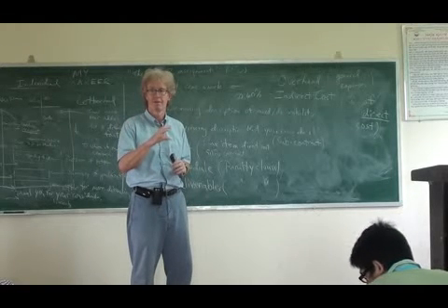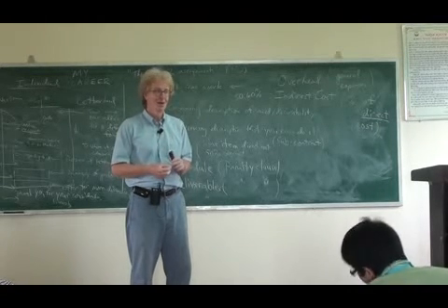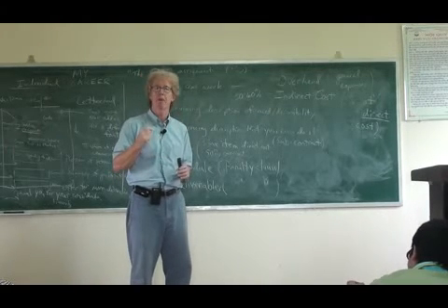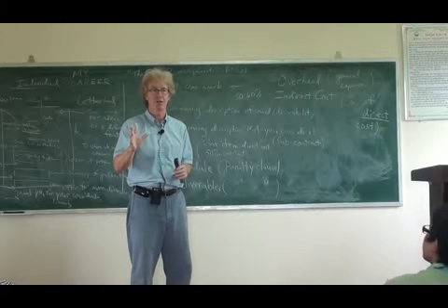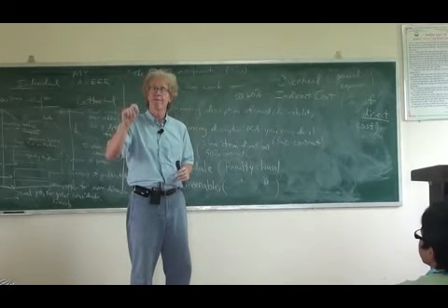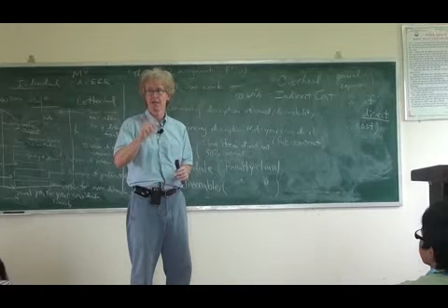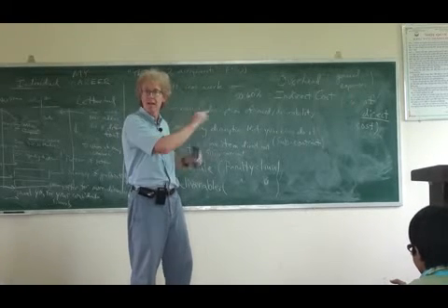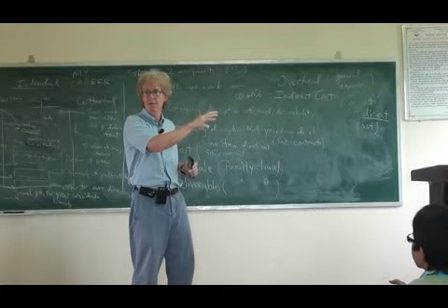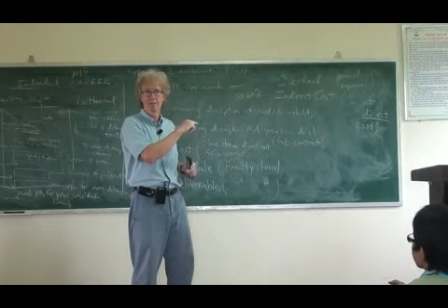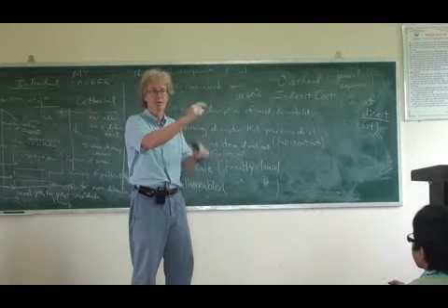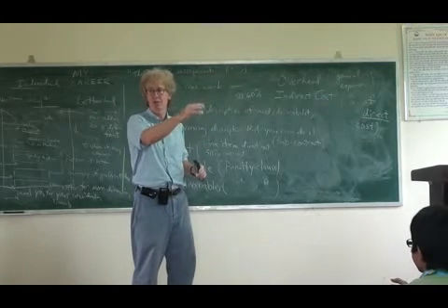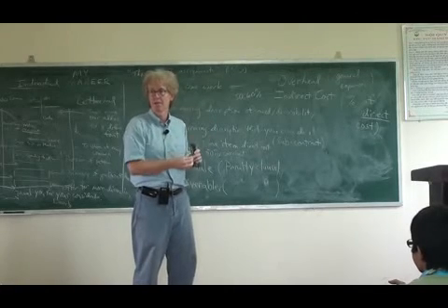per month. Okay. So I said, let's make this at least 6 months long. Let's say you propose to work 8 months and you have 5 engineers. So that's a total of 40 salary months, right? 8 times 5. And if the rate is $5,000 per month, then on the salary line you would have $200,000, 40 times 5,000. And you would have a little explanation. 40 salary months, 5 people at 8 months at $5,000 per month. That's how you got that number.